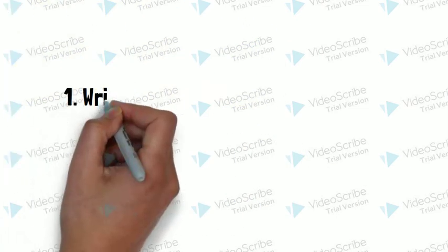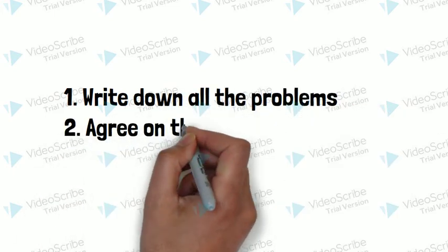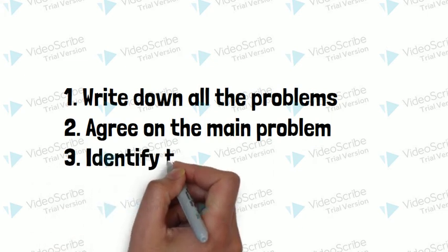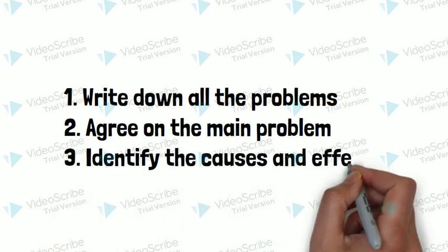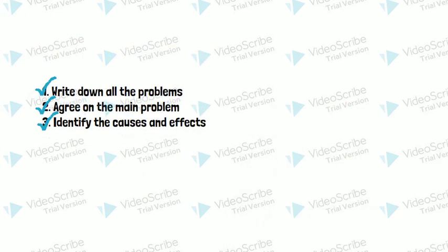Step 1: Write down all the problems. Step 2: Agree on the main problem. Step 3: Identify the causes and effects. If you follow these three steps, you can come up with your own problem tree.